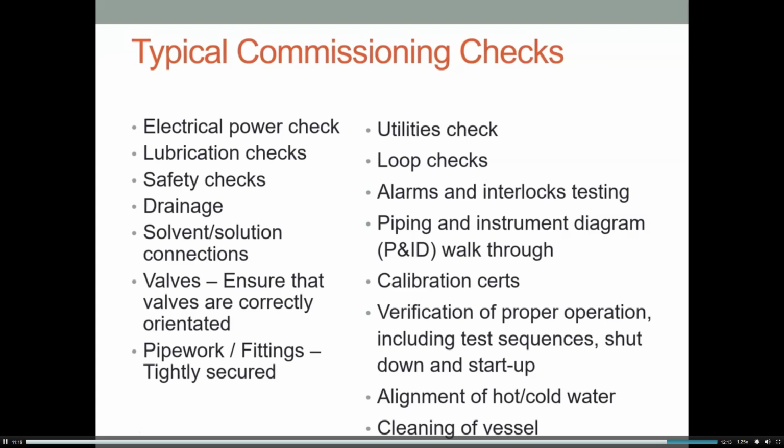The verification of the proper operation, including test sequences, and that would mean that you would simulate a shutdown and a startup to make sure that they are operating correctly. Alignment of hot or cold water if necessary, and then how you want to clean this piece of equipment. Is it easily cleaned, and are there any special requirements that you'd need to put in place?